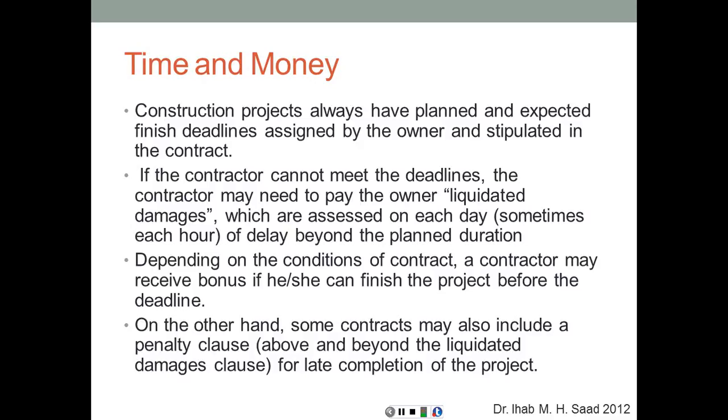Basically what we're saying here is that we're going to need to achieve more work in less time. Therefore, the duration equation was Q over P, quantity divided by production rate. The quantity is not going to change, therefore we need to increase the production rate. This is going to be achieved through, most likely, either changing the logic of the activities or using more resources for the activity, and these resources are going to cost money as per the definition of resources.